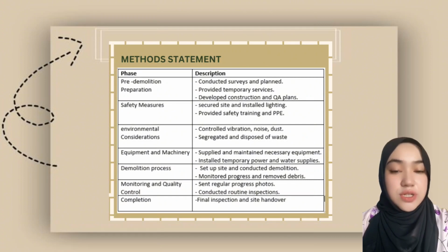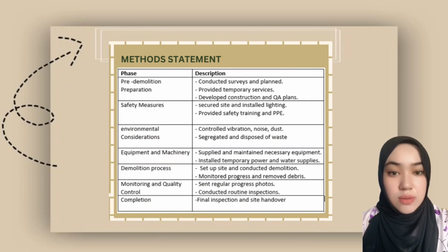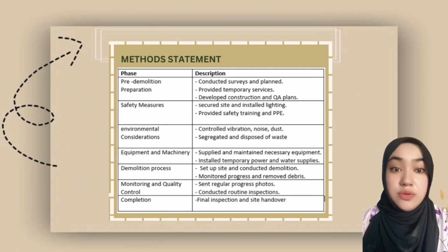For the demolition process, the demolition proceeded with careful planning and execution. The site was prepared, boundaries marked, and non-structural components removed initially. Structural demolition followed a systematic approach to ensure safety and efficiency. Debris removal was closely monitored throughout.